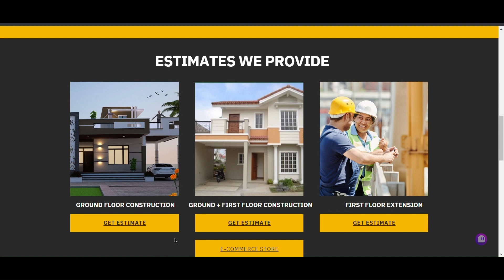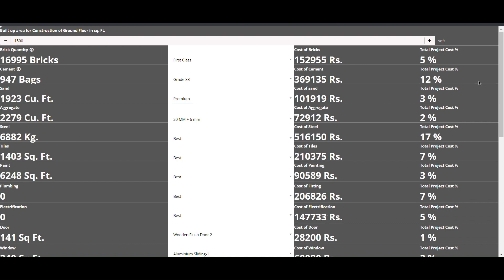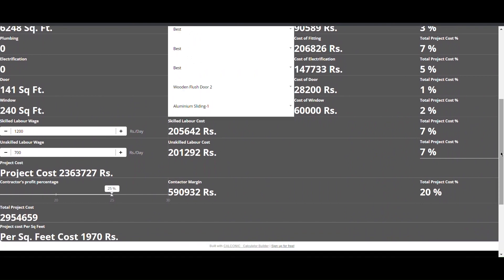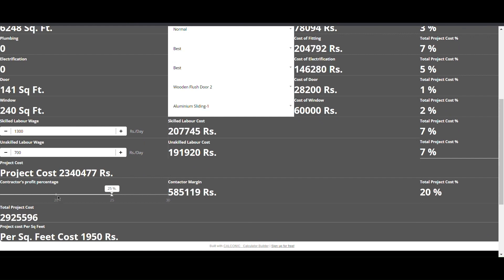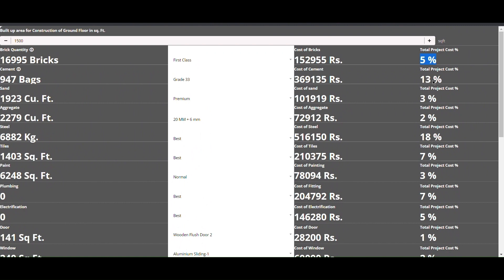The cost estimation process for the first two scenarios is similar, so we will proceed with ground floor construction as an example. As you can see, the built-up area is entered in square feet, and as soon as you input the built-up area, the required material and labor quantity will be calculated automatically and the cost will be shown. We can change the quality of different materials and the labor wage of skilled and unskilled laborers. The contractor's profit can also be changed from the slider bar, and all of this will be reflected in the total project cost as well as cost per square foot. The percentage of cost of each material relative to the total project cost will also be calculated and shown.